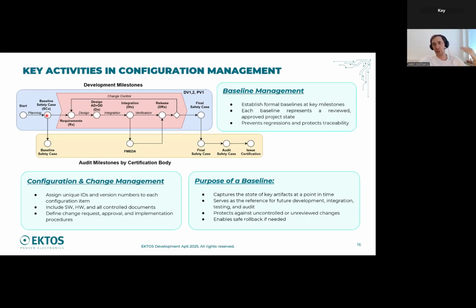And if we need to change them later on, we have to increase the version, put revision history, and at the end we have to roll back to any version of the documents we have. So it is the first baseline. The next baseline is requirements specification. So here we have previous documents and store also requirements in addition, and we have wider baseline. And over the lifetime, we are increasing our repository and put items there, and all the time,